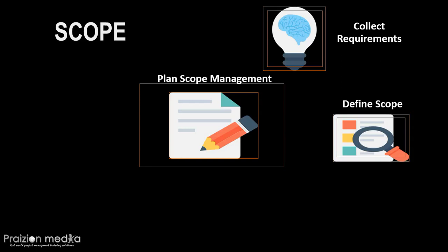It also defines the work that must be carried out to achieve the features, the requirements that have been defined previously. Also, as part of the project scope statement, we could have the acceptance criteria for the deliverable. So this is quite a robust document that I would advise you to look into in more detail.